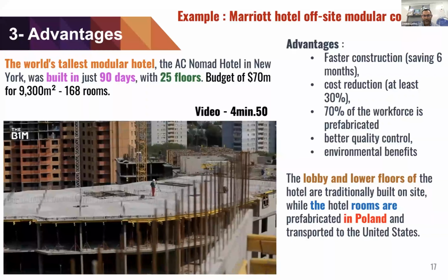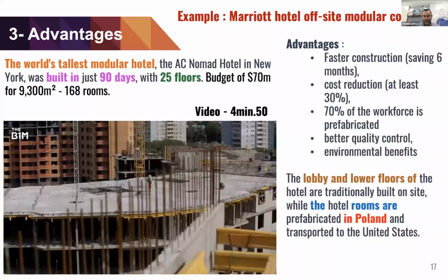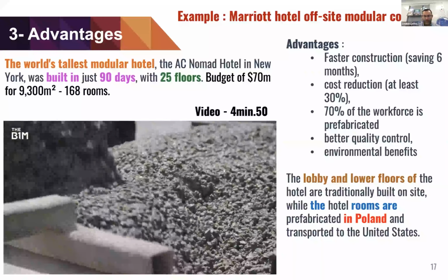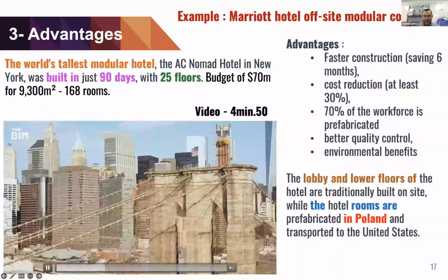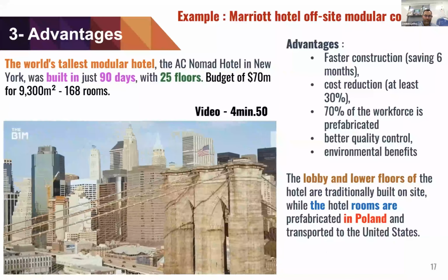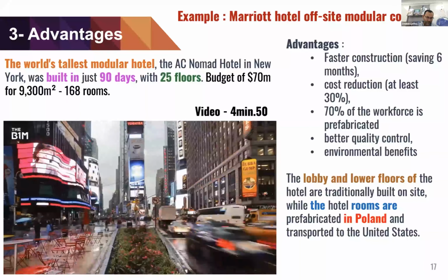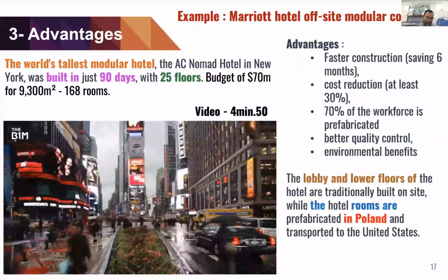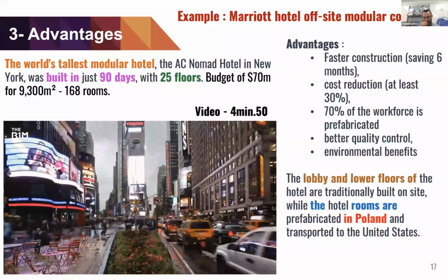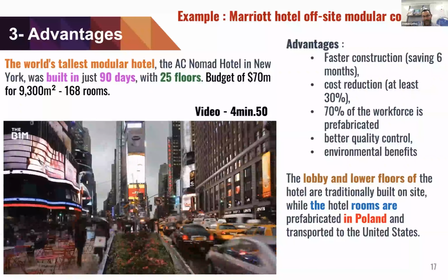Two key factors drove Marriott's decision to embrace an off-site modular construction approach: speed of delivery and cost. With high construction demand and a severe shortage of skilled labor in the United States construction sector, Marriott has seen the average build time for its new US hotels rise by 50% since 2011, a factor which significantly impacts revenue when capitalizing on new and growing markets.